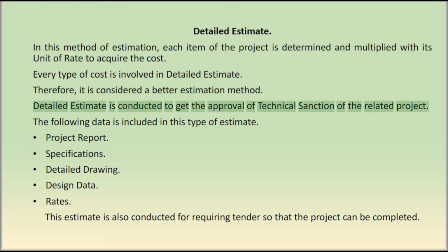Detailed estimate is conducted to get the approval of technical sanction of the related project. The following data is included in this type of estimate: project report, specifications, detailed drawing, design data, rates. This estimate is also conducted for requiring tenders so that the project can be completed.